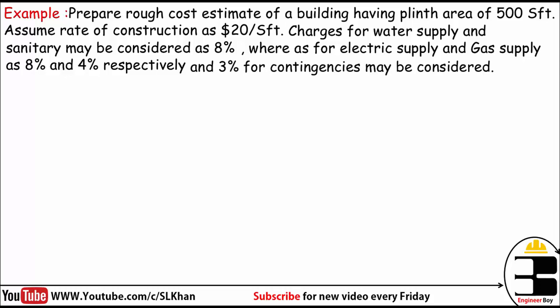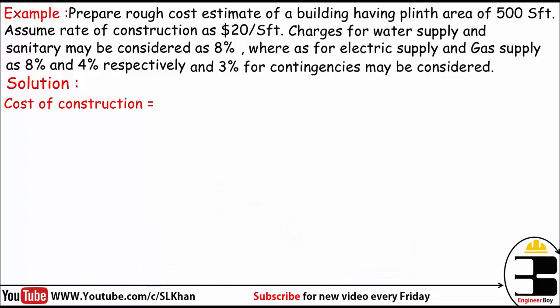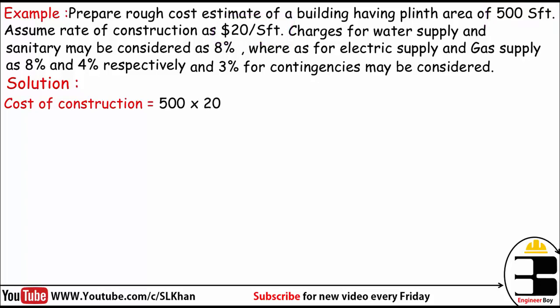To prepare the rough cost estimate of the given building, we first calculate the cost of construction. The total plinth area is 500 SFT, so we multiply this area by the rate of construction, which is $20 per SFT. We get the cost of construction equals $10,000.